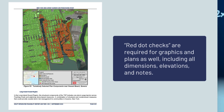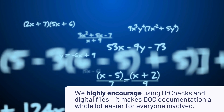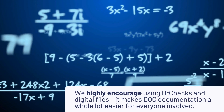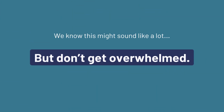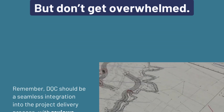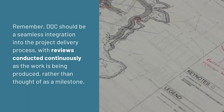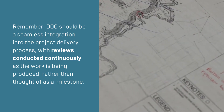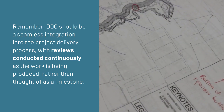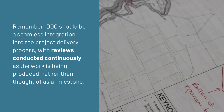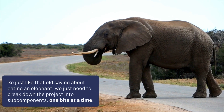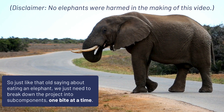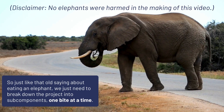We highly encourage using doctor checks and digital files — it makes DQC documentation a whole lot easier for everyone involved. Don't get overwhelmed. DQC should be a seamless integration into the project delivery process, with reviews conducted continuously as the work is being produced, rather than thought of as a singular milestone. Just like that old saying about eating an elephant, we just need to break down the project into subcomponents, one bite at a time.